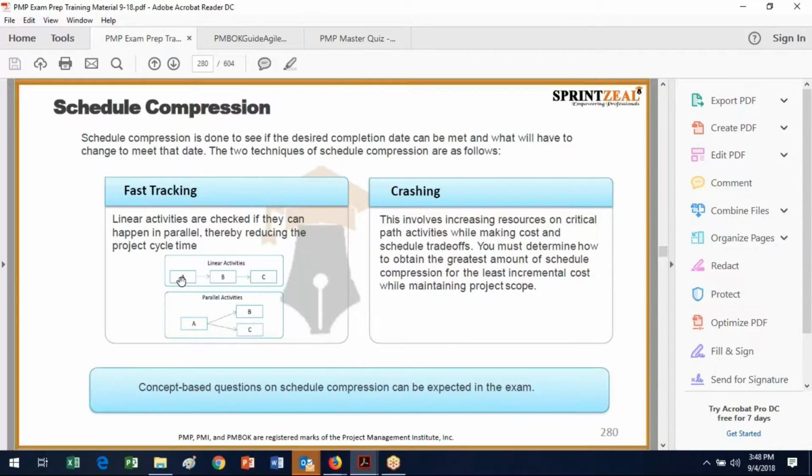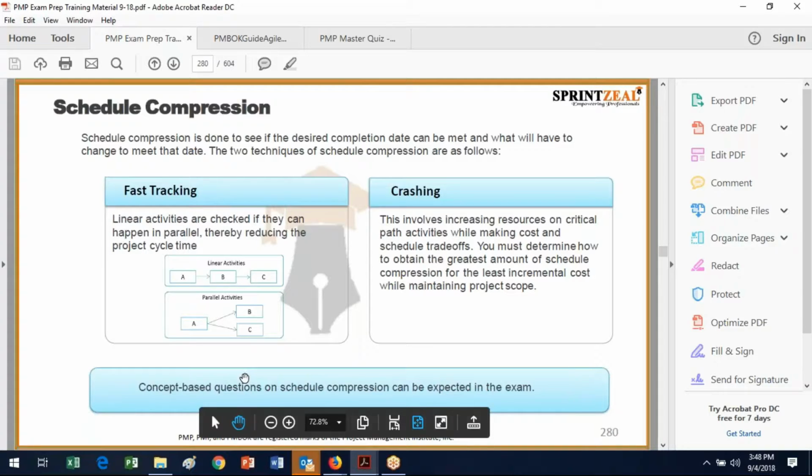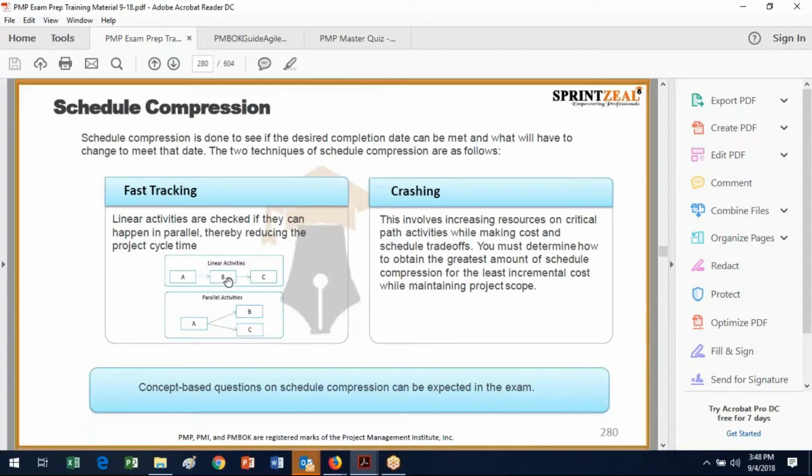But if this is like sheetrock, painting, carpeting, the problem of doing painting and carpeting relatively at the same time is, A, you're trying to occupy the same space to paint and carpet the same room, but B, you might spill some of the paint on the carpet where it wouldn't matter if you spilled some of the paint on the bare floor. So fast tracking can be good, and it can reduce cycle time, but you can also, to coin a pun, paint your way into the corner.